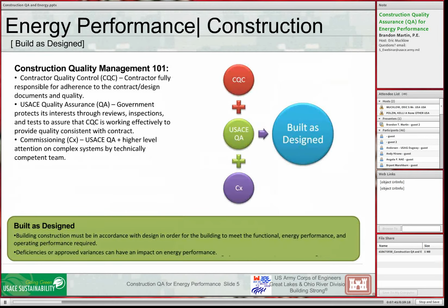The focus today is on construction. So we have a pretty good construction quality assurance process. We rely on the contractor to be fully responsible to adhere to contract and design documents. He's responsible for his own quality. Our role is to oversee his quality efforts to make sure they are implementing quality control adequately.